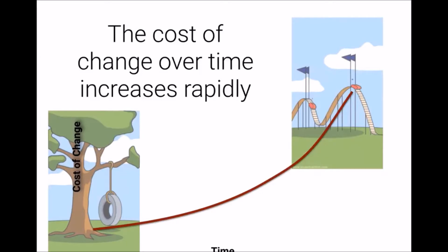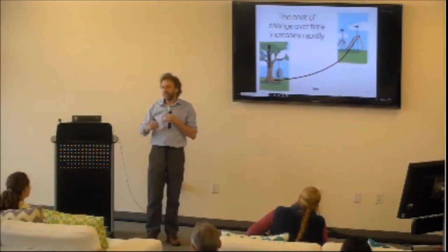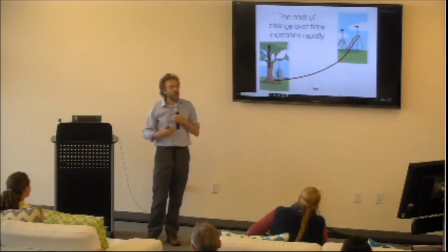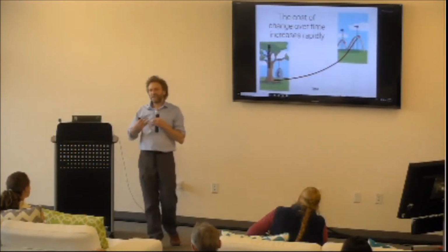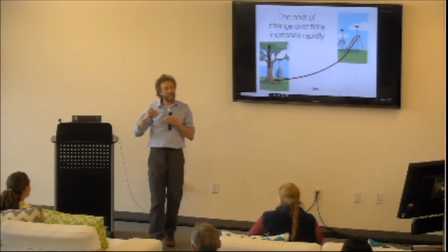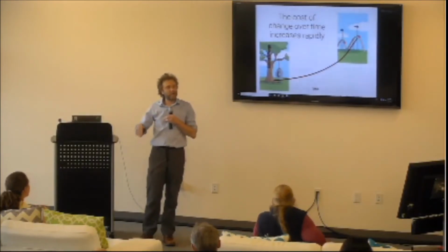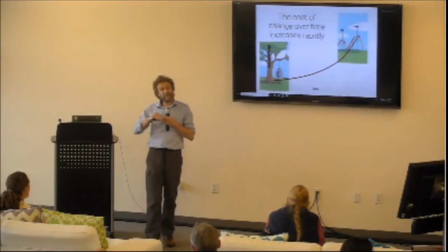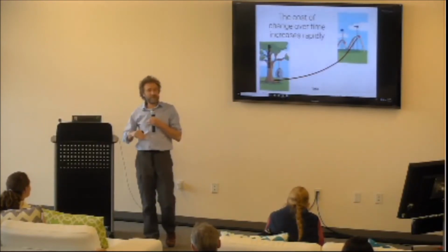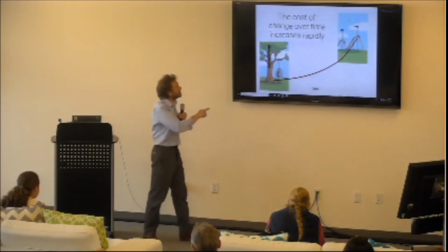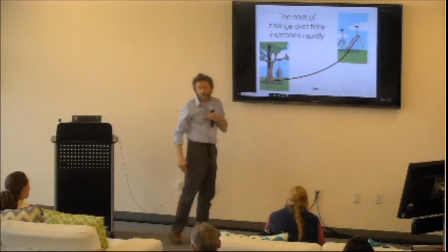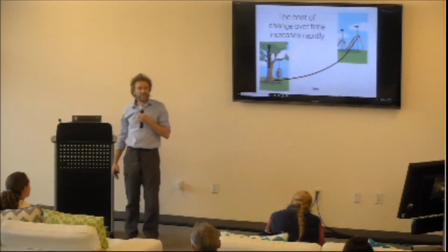What we soon find, though, is when we get onto our greenfield site, we start delivering software at high velocity. We just keep churning it all out, but we don't pay attention to quality practices, maybe TDD, maybe unit testing, maybe peer review. The quality of the code that we deliver does not stay high. And what happens is that very quickly, our ability to deliver new features on that code base becomes much, much reduced. So the delivery pace becomes slower, and the cost of delivering each change becomes more expensive. And this curve is a curve that people and projects have followed for decades.